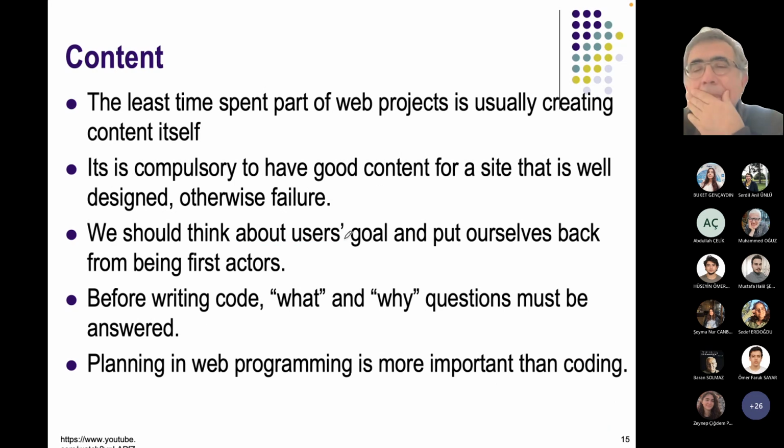Many web pages lack enough content. In web page development, the least time is spent on the part of projects that is usually creating the content itself. When people are developing a web page for the university, for example, explanations of the laboratories, information about the classes, the professors, and life on the campus is not easy, because you need to prepare the content.